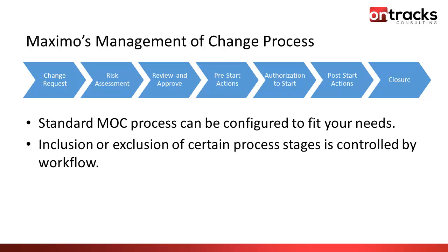Maximo's process also involves pre-start actions, which are essentially actions taken before the MOC process can begin. It also has an authorization to start, which is essentially verification that pre-start actions have been completed sufficiently, documentation has been updated. That is, once again, decided upon by one or a body of people.